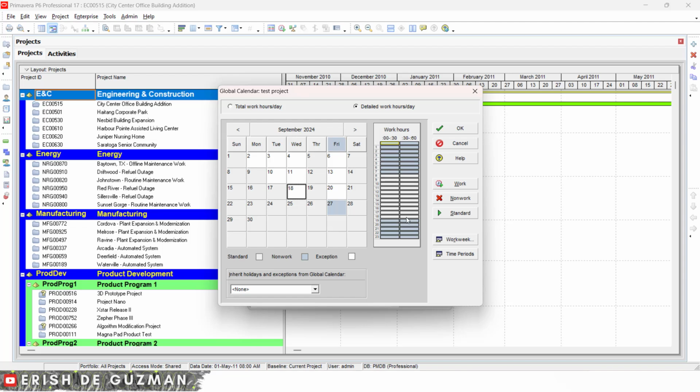Take note again, when any calendar is changed or edited or modified, the end date or the finish date of all activities assigned with the calendar will be recalculated or rescheduled based on the new calendar. So this might make a considerable difference to the project schedule dates. Every time the calendars have different start times and end times, some activities will span one day or more than the duration of the activity.